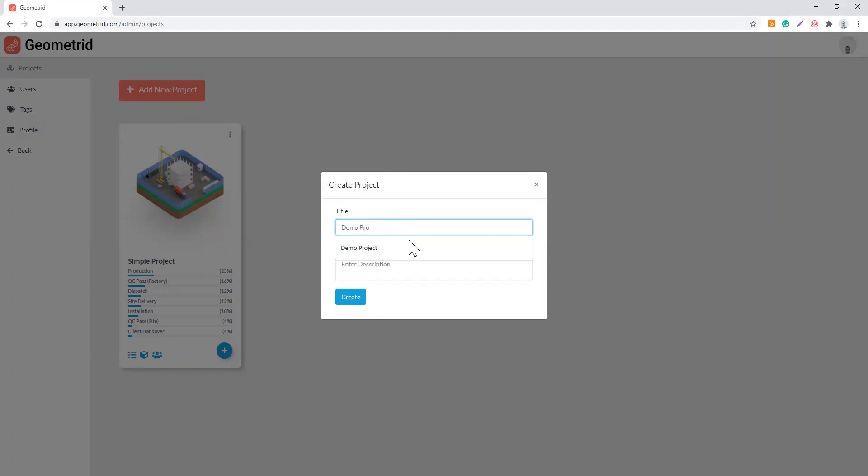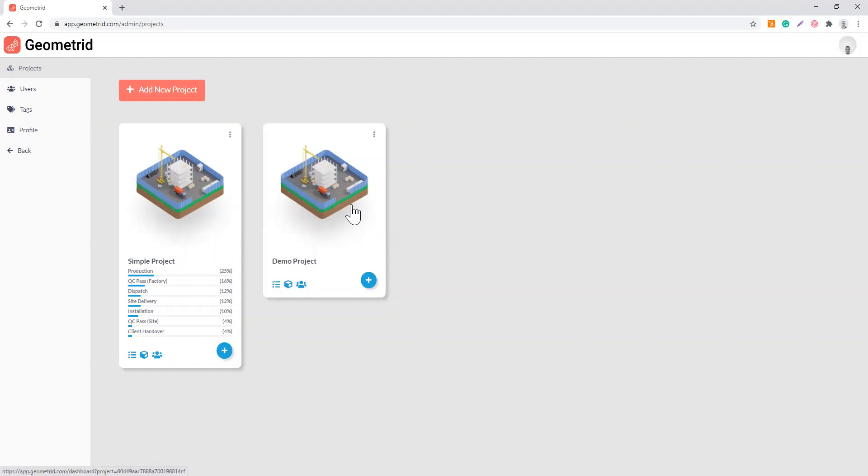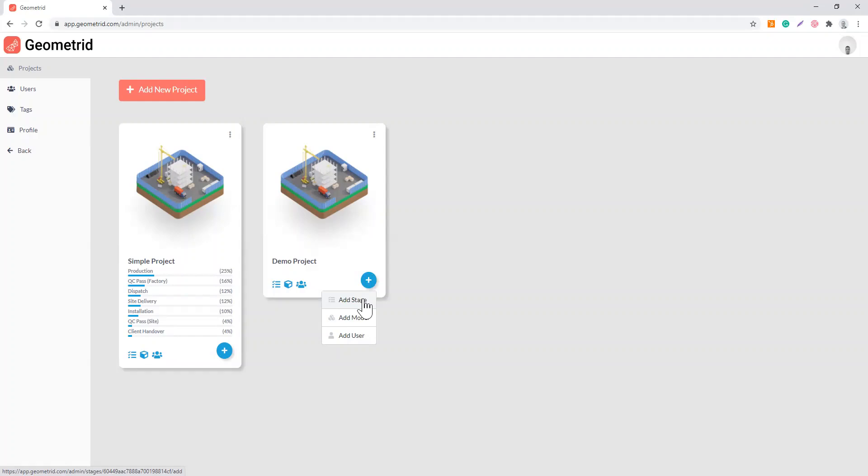Once you create your project, this is your workspace where all your projects are going to be shown. There are three things you are supposed to add for every project. The first thing would be the stages that you want to track, and then you can set up different workflows for different projects and you can add as many stages as necessary.